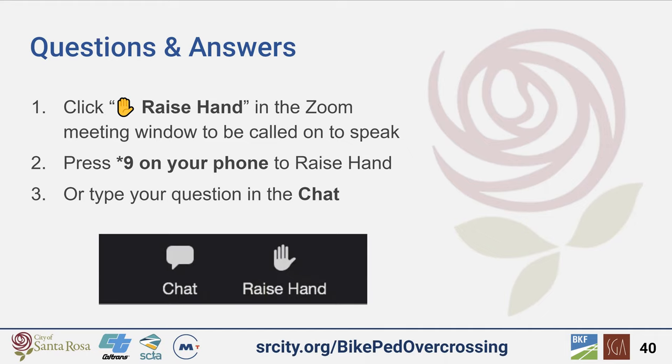So just as an introduction, Nancy Adams with the Transportation and Public Works Department. There's been a lot of questions about connectivity. And I saw in the chat, Jennings Crossing is also a project that we have in our capital improvement program. And I don't know if many of you know, but we tried to get that constructed a few years back, and we got the California Public Utilities Commission to do that. We actually had to get that refreshed because it expired this year. So we have two more years to potentially build an at-grade crossing at Jennings there at the tracks.